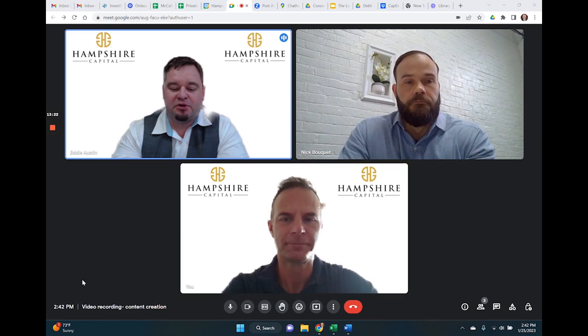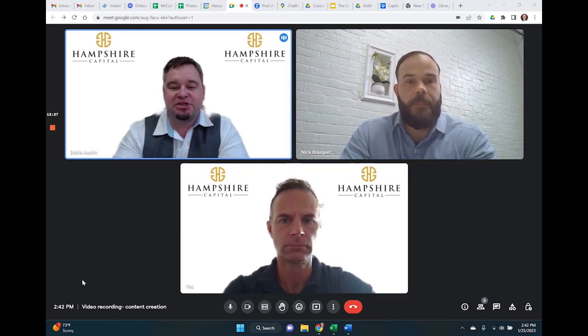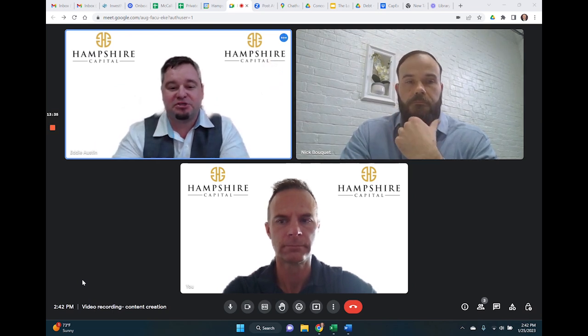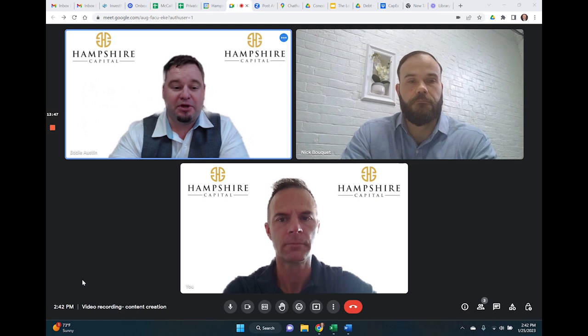I would say one of the most important things that I look at in a business plan is staying on your takt time. If we plan to renovate this many, we can look back at that business plan and see where we're at. Are we ahead of schedule? Are we behind schedule? Because somewhere in that, when we are not turning units fast enough, that's a cost point. It's costing us to not have those finished.